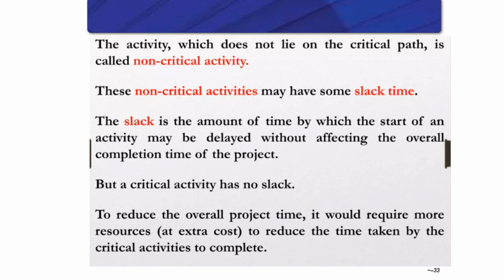These non-critical activities may have some slack time, meaning the difference between early starting and latest starting, or early finishing and latest finishing. A critical activity would have no slack time. So that's quite a good criterion to see if a path should be considered or not.